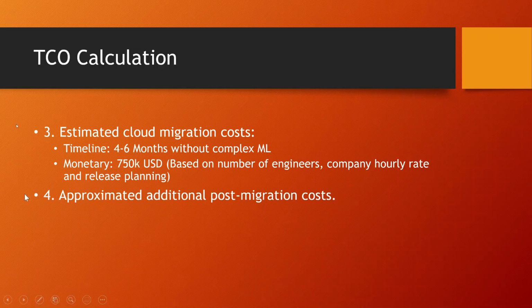The fourth point that I added also needs to be thought about, because after the migration is done, obviously this is not going to work without human supervision. So continued integration and testing of the apps, training, labor, security, compliance, administration of the cloud solution. It needs to be forecasted in order to estimate the post-migration budget. So this is definitely a point that one needs to keep in mind, because that's some hidden cost that can be incurred later on.